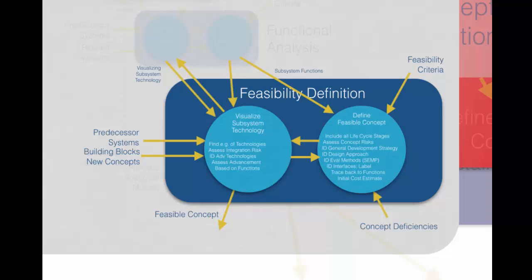The purpose of my system is to operate most of the time in environments such as this, since these kinds of environments are what will drive the desire for the vehicle operators to remain in their vehicles. Therefore, I will identify that these environments require particular attention to the operation of my system. Another example: a drive-through style scenario sounds a bit more feasible for operating in extreme environments, but after some research and investigation, it will require a lot more setup and equipment in order to operate compared with something like a robot arm. The same kind of thought was applied for the other concepts I've identified to meet the need.